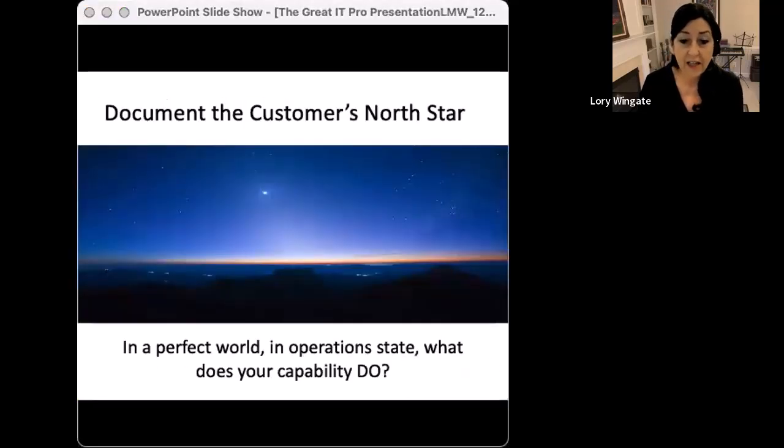All right. So if your customer has no defined requirements, which happens often in R&D, then it helps to use natural language to try to obtain a vision of what the customer is aiming for. You can still decompose these over time and develop test, verification, and validation plans. But what you want the customer to do for you here is to call out what I call the project North Star. If you can get the customer to describe what this thing that they want will look like in its operations phase in a perfect world, then you can often work back from there.